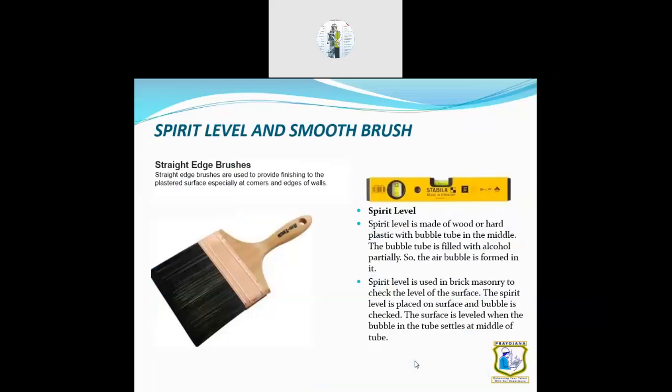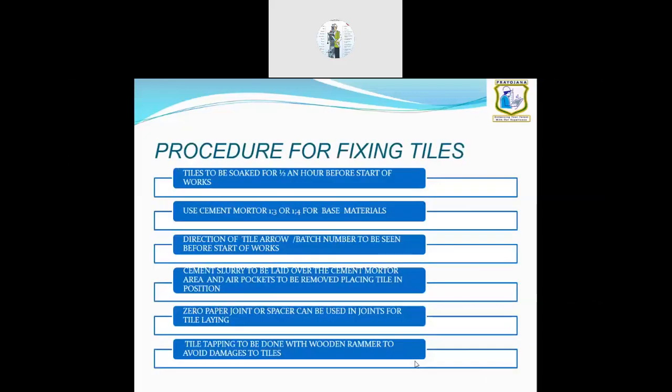Once the tiling is done, for 24 hours nobody should be allowed to step on the tiling area. So you should block that particular room with some enclosure and put an instruction there: nobody should step on the area. For one day, 24 hours, you should take care that nobody goes inside the tile-laid areas. That should be taken care of.